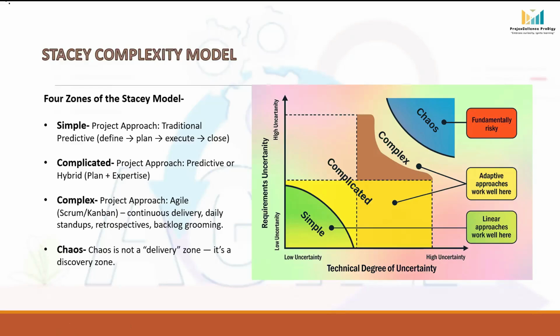So this will need experienced electrical engineers, mechanical designers, and coordination with local authorities. Why is this project in the complicated zone? Here, what to do is clear, meaning requirements are defined, but how to do it involves multiple expert inputs, feasibility checks, and sometimes redesigning parts of the plan. You may encounter site-specific challenges like space limitations or outdated wiring.